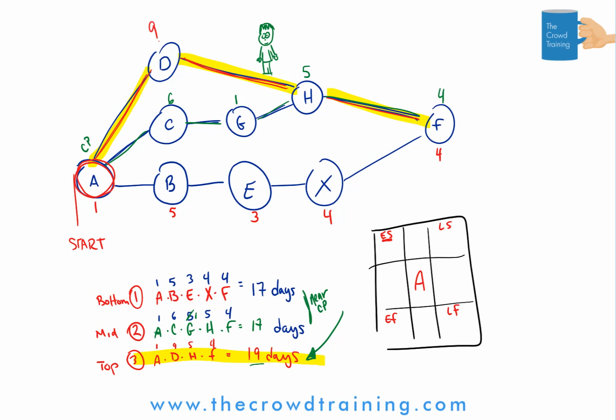One answer could be that you can start it at day 1. You can also say you can start it immediately at day 0. I can just start. So either way is correct as long as you stay with it through the rest of the project. You cannot switch between a day 1 and a day 0 concept, because all your calculations will be off by, well, 1 day.